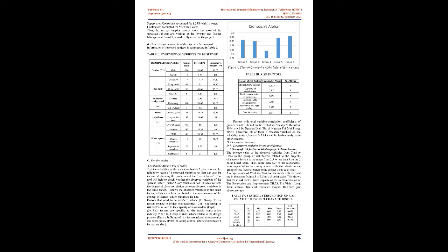If the R5 economics and legal policy factors occur, they will have a great impact on the success of the project — the project may have to delay, postpone, or go bankrupt. For example, in 2011, to stabilize the macro economy, the government issued Resolution No. 11-2011-NQCP on reducing equity investment by suspending and rescheduling a series of projects. Considering the current economic context, this group of factors does not affect the Renovation and Improvement NH.53, Tra Vinh A Long Tone Section, Tra Vinh Province Project, due to the identified and arranged capital and the project having deployed 70% of the volume. R6: The group of risk factors related to the price slippage factors that cause excess investment — the price of fuel.